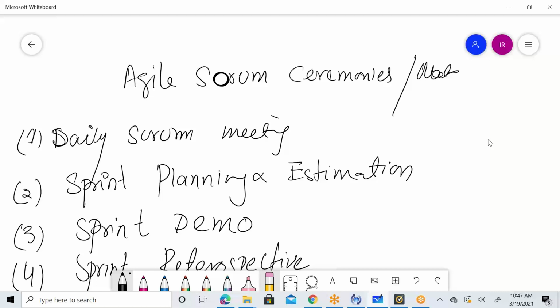So if I'm saying the application is going to be divided into major components, that does not mean each component needs to be completed in one sprint. You only have a 2-week timeline. Then further, that major component is going to have multiple functions underneath it. Let's suppose under that component there are 10 functions, I might need 3 sprints to complete those 10 functions. Now within whichever sprint they have an issue, I only have to go and change that. Do you understand this?